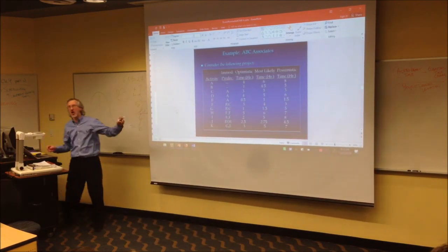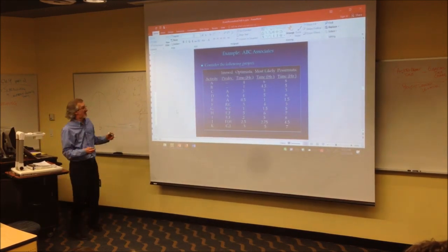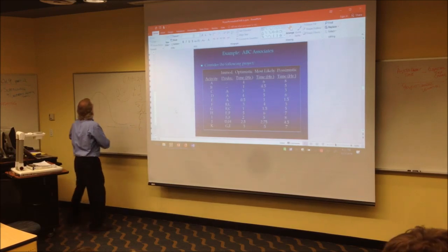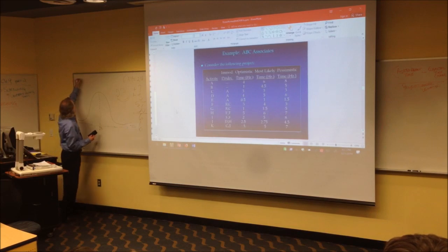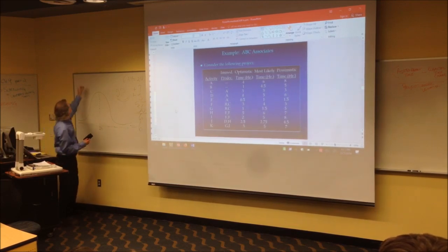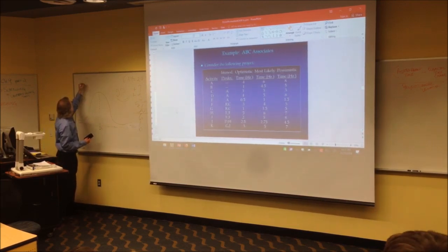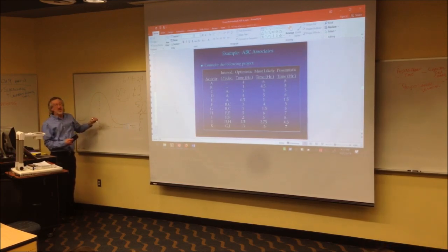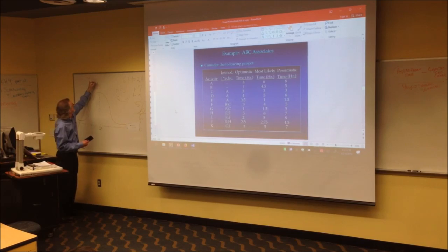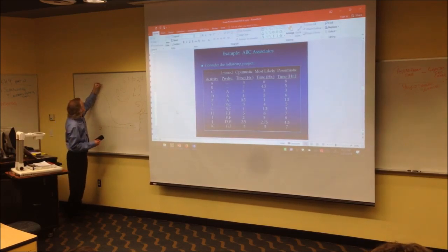So, are you ready? The critical path we know, and we're going to calculate the variance for H, which is the longest amount of time, a 7, minus the shortest amount of time, which is 5, right? And then we take that and divide by 6. What's 2 divided by 6? 1/3. Then, square it.